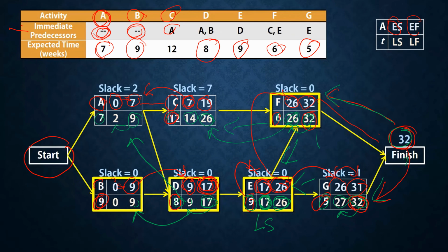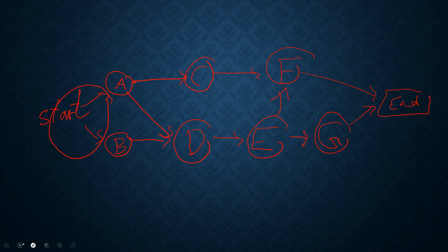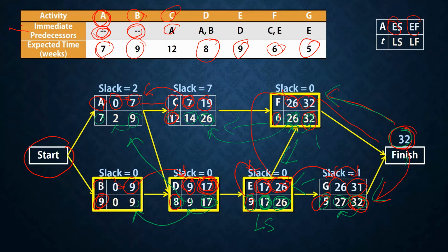Now we have to calculate the slack. How will we calculate the slack here? Slack is equal to late start minus early start, or late finish minus early finish.